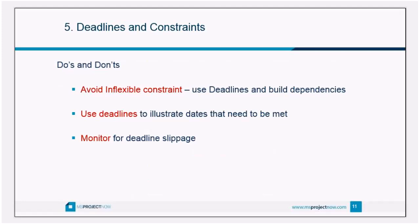We're also going to talk about deadlines and constraints. If you see a lot of warning messages from the planning wizard about scheduling conflicts, the reason is that at one point you've put a hard constraint on a task. A hard constraint — finish no later than, start no later than, must start on, must finish on — avoid those at all costs. There is a better way to show that a task or project has to finish by a particular date: use a deadline. Many people who've used Project for years aren't aware of the deadline feature.